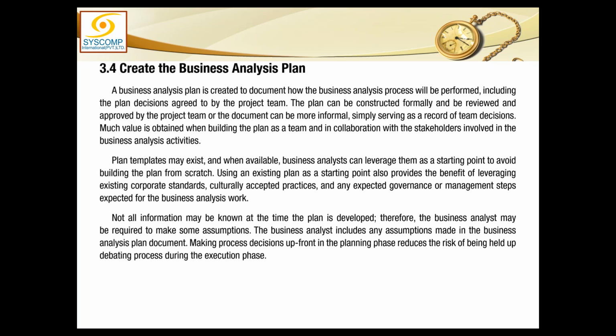Not all information may be known at the time the plan is developed. Therefore, business analysts may be required to make some assumptions. I hope this is very clear. We all keep doing that. This is a normal phenomenon: we plan things, but some of the facts are not available at that point in time, and therefore we make assumptions. The business analyst includes any assumptions made in the business analysis plan document.